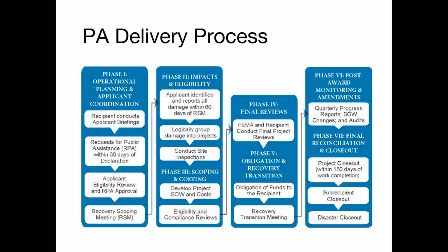Projects are paid out depending on the size of the project. The state share is not paid out until the project has been closed. The PDMG then will coordinate a recovery transition meeting to transition the applicant from the project development phase to the sub-award management phase. Amendments and time extension requests must be submitted in writing to HSEMD. Consult with your state rep if you have any questions.